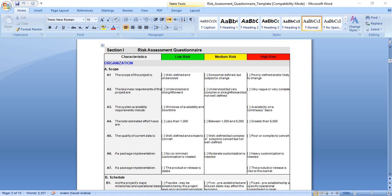To complete the questionnaire and the checklist will identify the project's risk factors. The results from the completed questionnaire and checklist should be used as guidelines. There may be other factors that will lower or raise the risk level. For instance, a large project carries inherently higher risk. This risk may be reduced if an experienced project manager is assigned. Having many higher risk characteristics doesn't necessarily mean the project will fail. However, it does mean that a plan must be put into place to address each potential high risk factor.